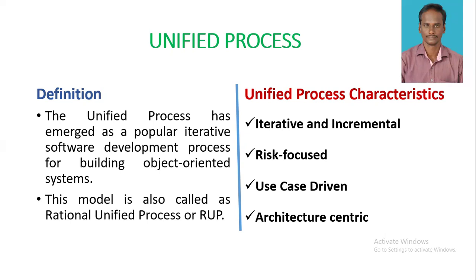The second one is risk focused. The unified process requires the project team to focus on addressing the most critical risks early in the project lifecycle. The third characteristic is use case driven. In the unified process, use cases are useful to capture the functional requirements and to define the contents of the iterations.